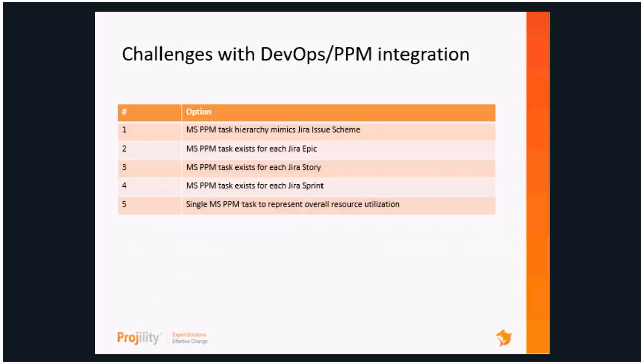So if I have one project that's tracking an epic level, another one's got detailed stories, another one has sprint stories and epics, how do I aggregate this information? And how do I map that over to schedules that are in Project Online when there's no consistency there? So this is one of the challenges, is defining that. If your organization can define what level you want to track at, the integration can happen in an automated way. If it can't do that, and if you're going to allow each of the Agile teams to work as they want to work, you're always going to have challenges with statusing.